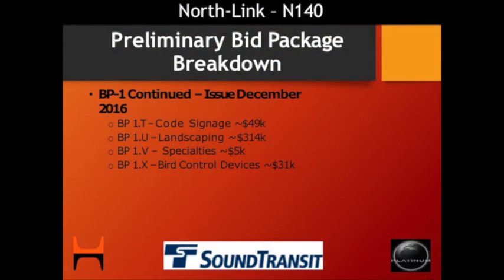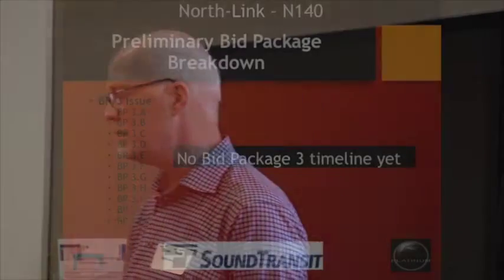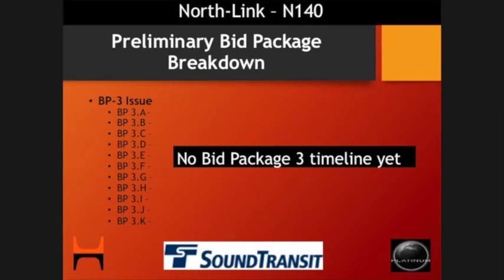Now, I've got an error here. The landscaping is now folded into our big package 1A, so that $314,000 is not standalone anymore. Specialties, which is toilet accessories and the like, about $5,000. And then bird control devices and installation, $31,000. So that's bid package one. There will be a bid package three in the future for elevators and escalators, and bid package two will be concrete.